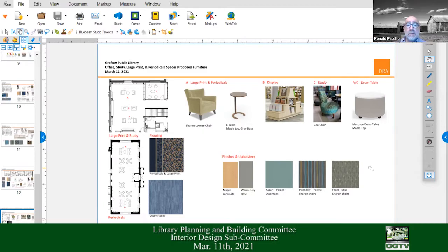Yeah, Beth? Go ahead, Beth. I thought that even though we eliminated the shelving, the plan was still to purchase it for future growth now so that we have it and that we get that 50% reimbursement and so that it matches and that it would be attic stock. Is that not the case? That was my understanding. So we need to make sure that that's included. I will double check and make sure she included it. I mean, we're still 50% over budget, which is a lot.